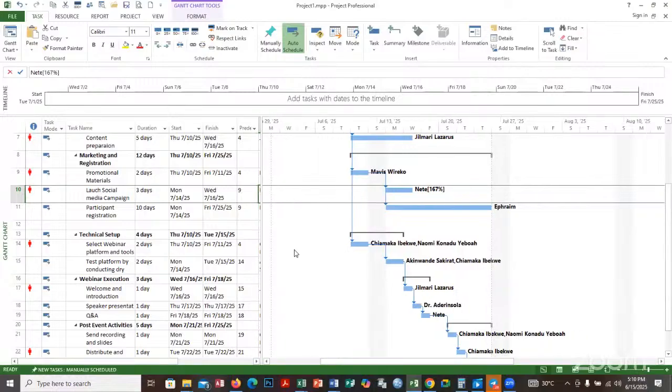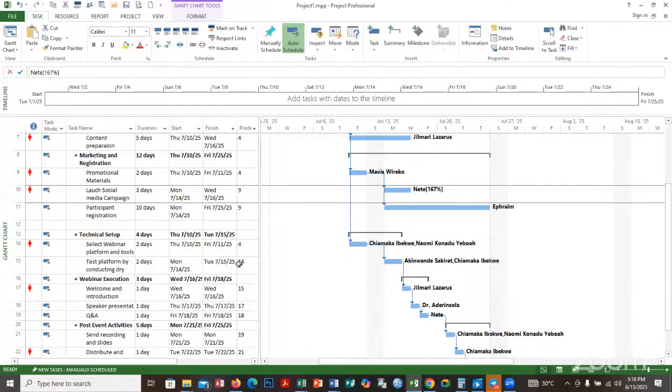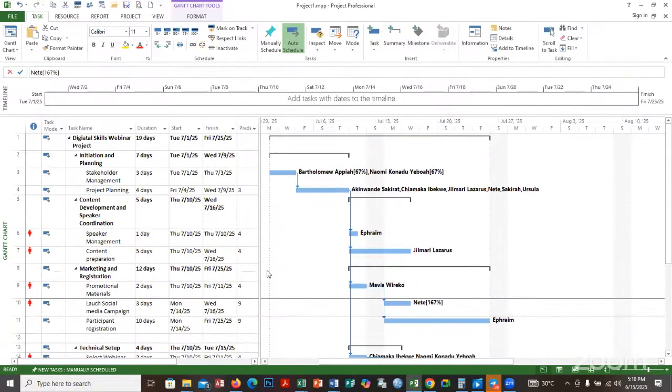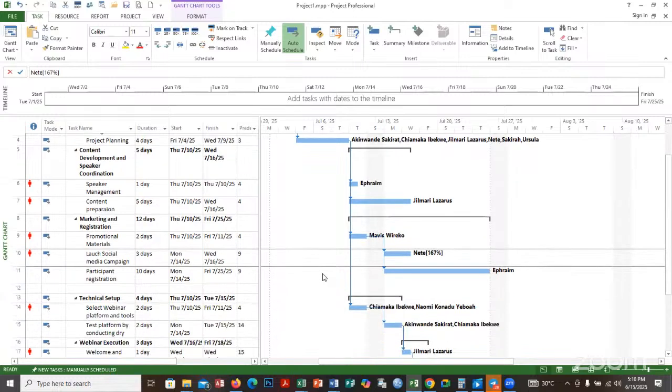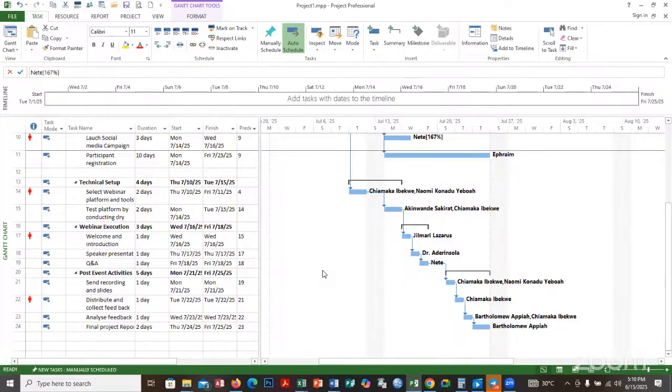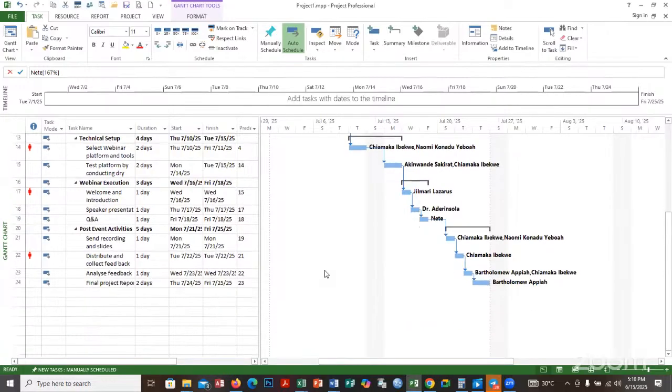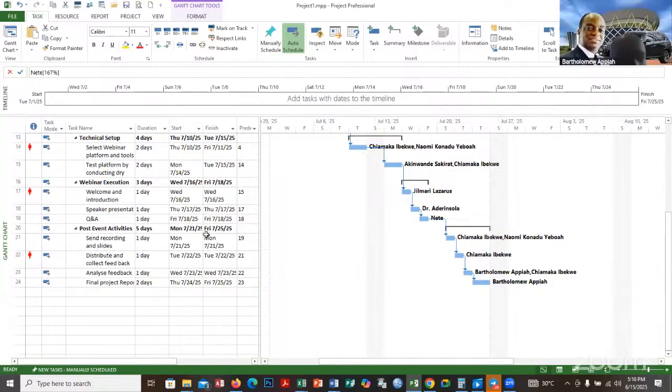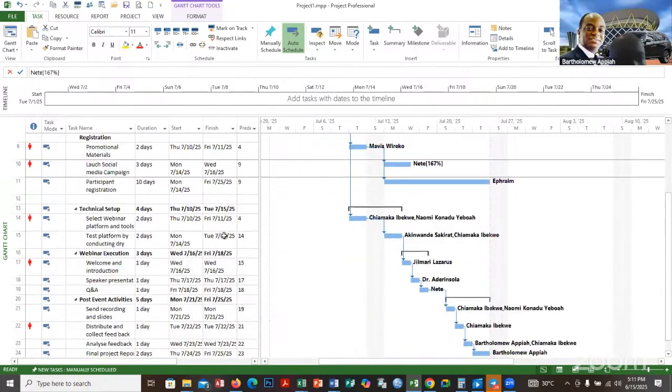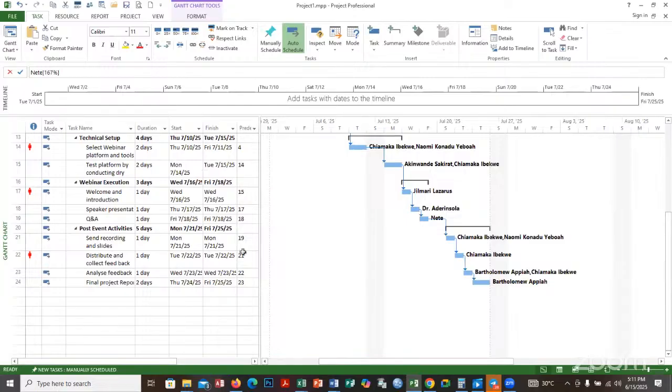You first define your requirements, say 3 days, and you design your mockups, maybe 5 days. Develop the front end, develop the back end. Definitely you can't test the website until you have done your development. Do you understand? So your schedule needs to show your dependencies. What is depending on what? I don't know if you get that. Okay. So that's one thing that is missing in your project schedule, which has to be fixed.